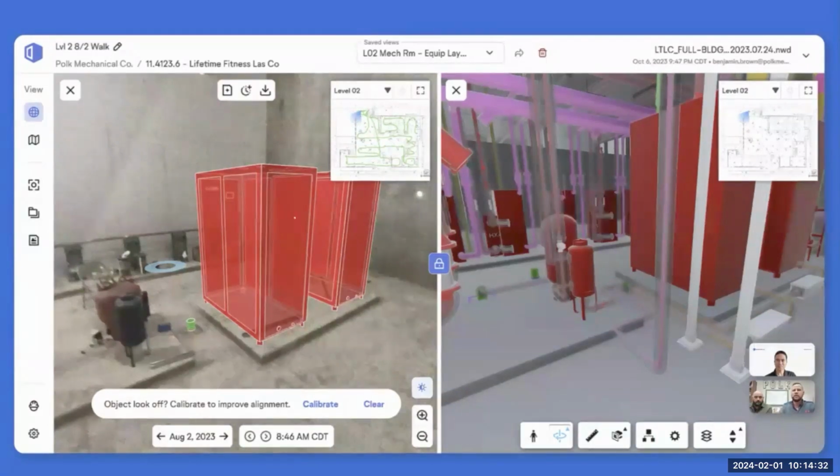Especially if you've taken the time to go ahead and bring over elements from the model into the real world view. Yeah, you could utilize the same thing for progress, right? You could take that saved view as an application for today's date, and then a week from now check against that, right? So for billing purposes, for all kinds of scenarios where a save could come in handy for that specific activity, right? Or that specific model picture snapshot in time where what's installed against what's modeled, for billing purposes for sure.